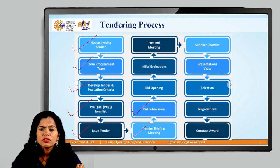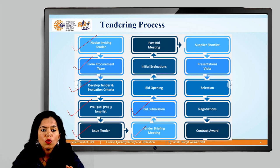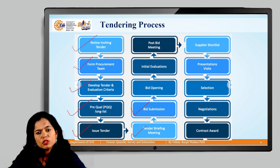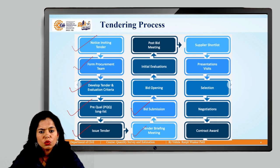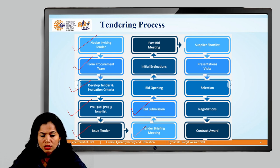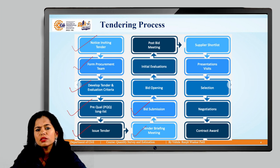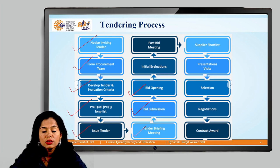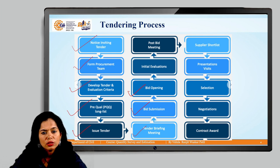After the pre-bid meeting, the contractor submits their bid in a given format — the envelope system, which we will see next. The bid is opened on a specified day in front of all contractors, not in a closed format. This can be done in one stage, where the whole document is opened, or in two stages.